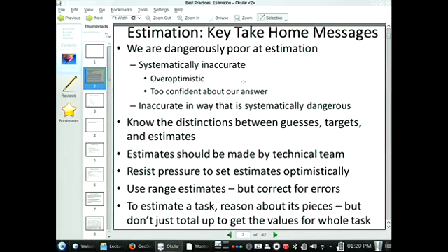It's going to take me 2 months to deliver on this, and it's not clear how wide that error bar is. It's not clear how wide that confidence interval is. It's not clear how wide that credibility interval is if you treat it from a Bayesian perspective. So here, range estimates are a way of providing information to those who are seeking these estimates that there's quite a degree of uncertainty here, or there's less uncertainty. And that can be very valuable.